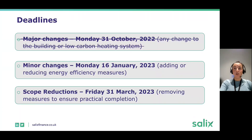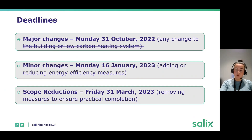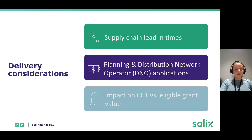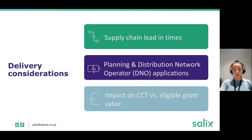To reiterate the deadlines: major changes are no longer accepted for single year projects. Minor changes, including adding or reducing energy efficiency measures, are accepted until Monday the 16th of January 2023. Scope reductions, including removing measures or sites, can be accepted until Friday the 31st of March 2023, the grant end date for single year projects. These deadlines exist because supply chain lead times have been exceptionally longer this year, and planning and DNO applications can take longer than anticipated — we want to ensure you can spend the grant by the grant end date.